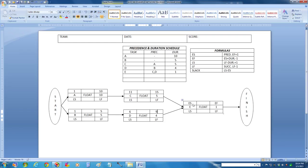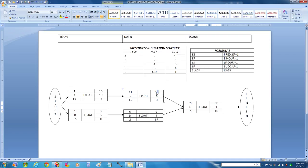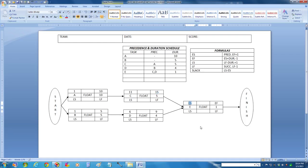Now we've got a choice. To calculate the earliest start time for activity E, we have to examine the earliest finish time of both activities C and D, as they are the precedent to activity E. On the forward calculation, you use the maximum of the two earliest finish times — in this case, task C's value of 15. So take 15 and add 1, which is 16. Its duration plus its earliest start time minus 1 is also going to be 16.